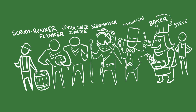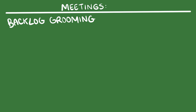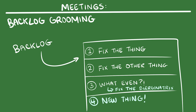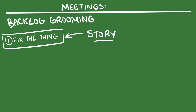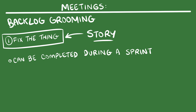Scrum also calls for a series of meetings that you must attend during your sprint. Before your sprint starts, you will attend the backlog grooming meeting. Your backlog is just the set of all the tickets that you have to work on. This is a meeting for writing tickets, clarifying tickets, chopping up tickets into smaller sub-tickets, prioritizing tickets, and taking tickets out for a date night once in a while so that they feel special. A lot of people in Scrum call tickets 'stories' — because they take less than two weeks to finish, have an ending that's satisfying for the product owner, and also because if you fall for more than three of them you will probably break your legs.